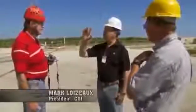When we walk around the structure, you'll see that we have a lot more structural weight and a lot more structural capability on the north side than we do the south. Marc's demolition strategy looks something like this. From a single trigger point, he'll ignite a charge that travels through two lines at over 15,000 miles per hour. The charge will ignite explosives loaded into the front of the first five levels. The tower should begin to fall. Then a second set of explosives will detonate on the seventh level, creating a notch for the weakened tower to fall around. But there's a catch.